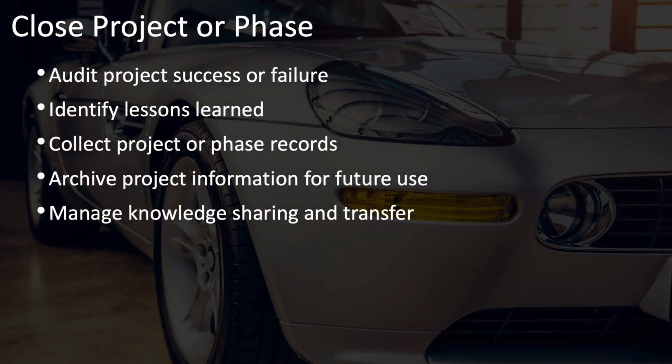As you close your project or phase, you should also check to see if your project or phase met the appropriate success criteria. And if not, you may want to do some root cause analysis and identify specific lessons learned for why it did or didn't meet project success. You'll want to make sure that you collect all of your project or phase records and that you archive all of this information for future use and wrap up your knowledge sharing and knowledge transfer activities.